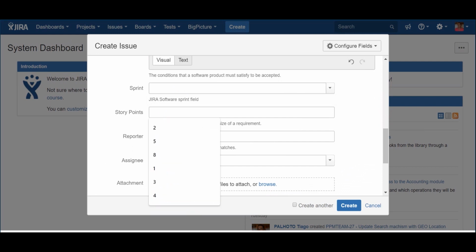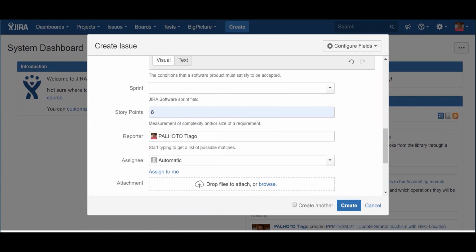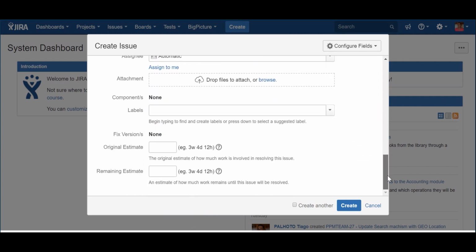Story points. Just like for the sprint described before, the story points are used in the exact same way as for the user stories. They provide a relative measure of size and they are used to help determine the velocity of the team. So, this was the last of the requirements items that I have in the model. Next, let's take a look at the scaling Agile items and their most important fields.